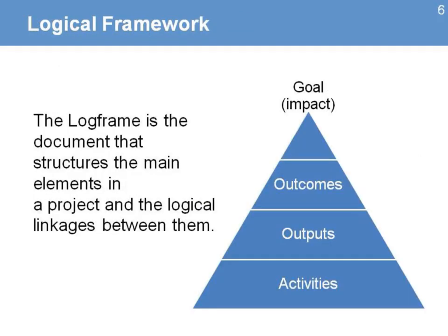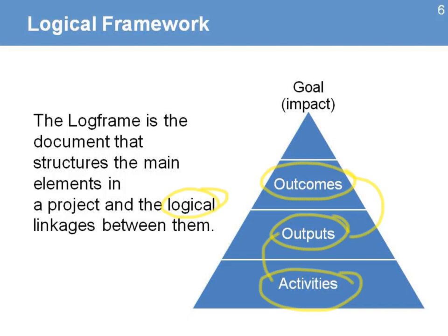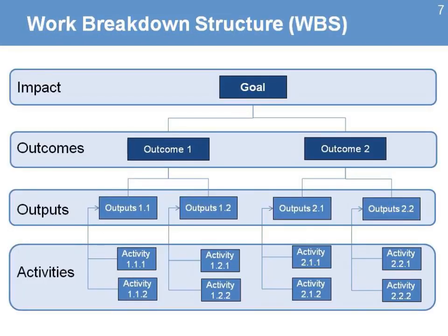The logical framework is the document that structures the main elements in the project and the logical linkages between them. This is the logic of the project. This is how the project was designed. It defines all the activities that are needed to produce outputs that will eventually produce outcomes. So that is the logic that we have designed in the project, and they become the basis for scope management plans. One of those tools that we're going to use is the work breakdown structure.